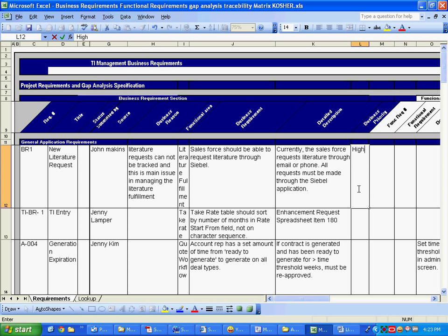So this methodology is developed by you and the project manager and everybody, and you can change it. You can be creative here. But once it is set, you're supposed to use that. In the first few days of the project, it may not be set, so they might ask you for your input. What do you think? High, medium, low will do, or you think high, medium high? Say 1, 2, 3, 4, 5. I always think 5 levels should be there. This is my own thing. I always prefer 5 levels for some reason. So I say 1, 2, 3, 4, 5, 1 being high, 5 being low, and 2, 3, 4 everything intermediate.